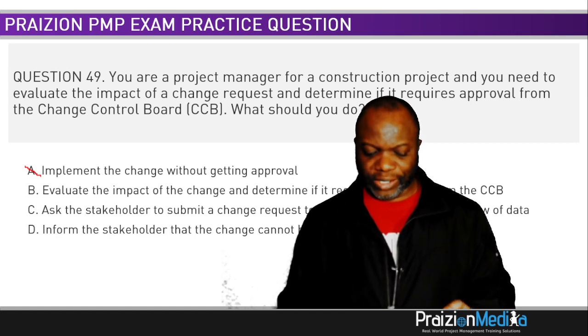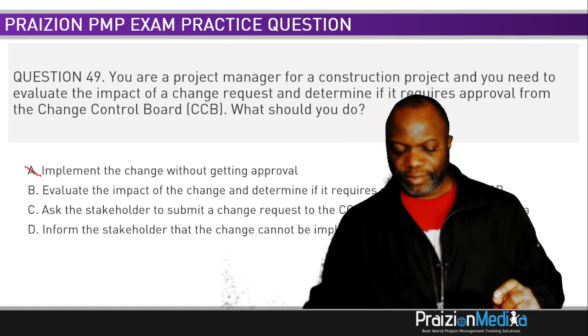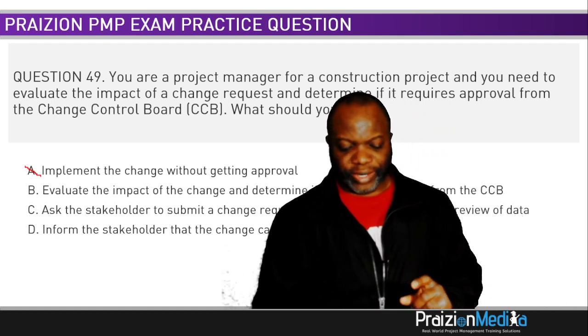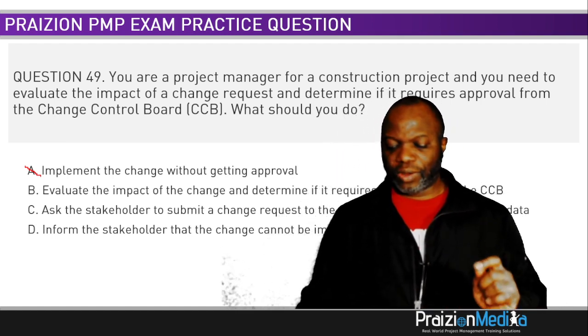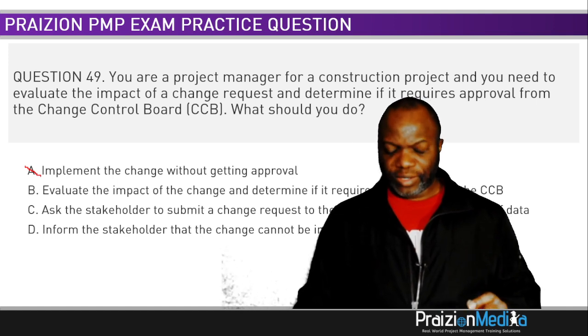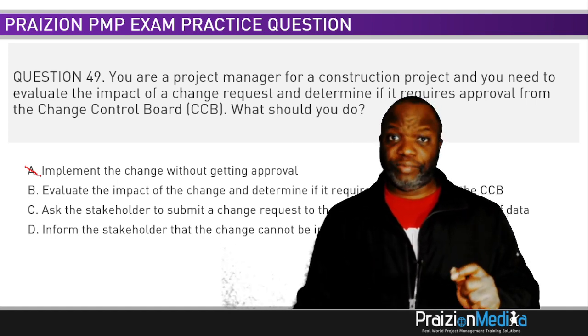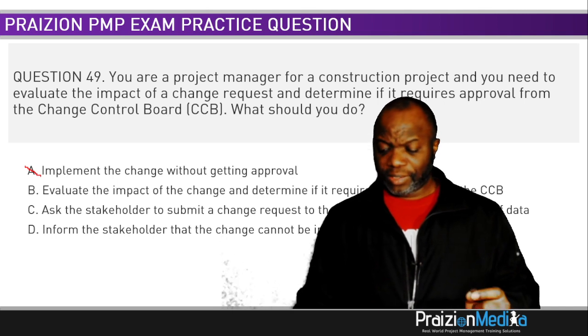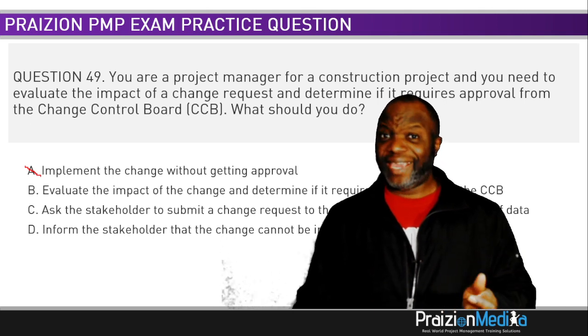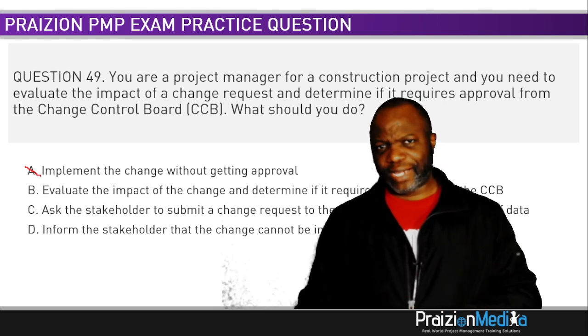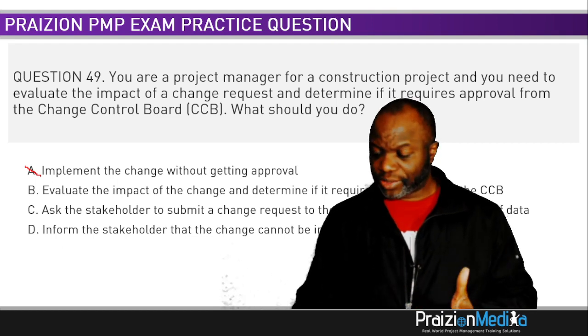may impact any of the project baselines, a formal integrated change control process is always required. You see that? So what you can glean from that is if it doesn't touch the baselines, a change request may not be required. We're not saying it's always, but may not. It depends on the company.